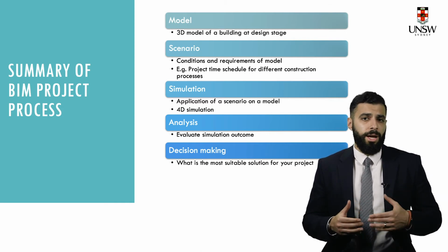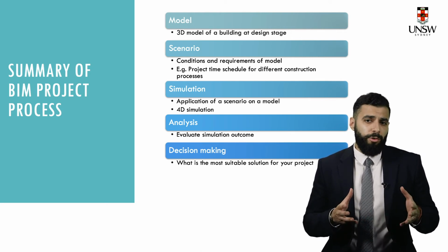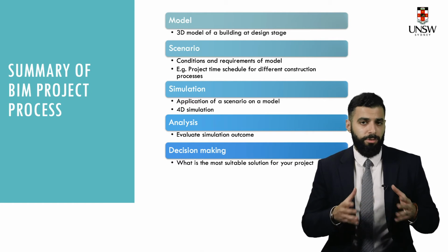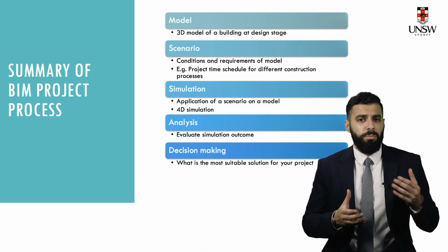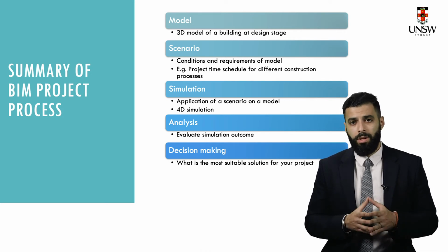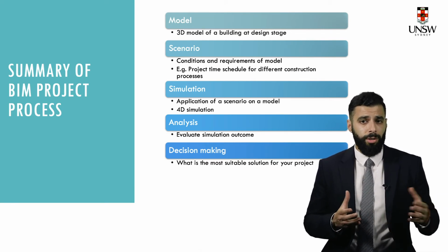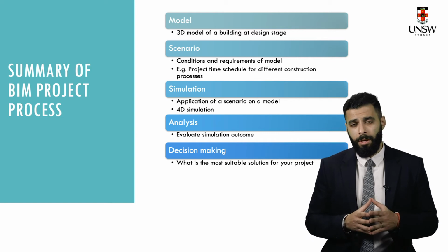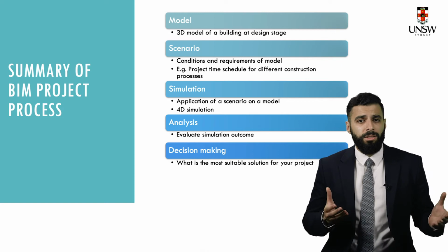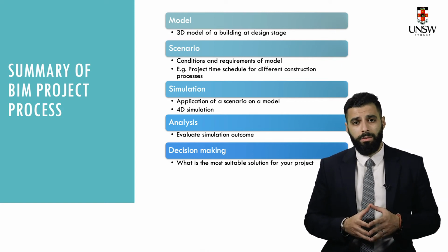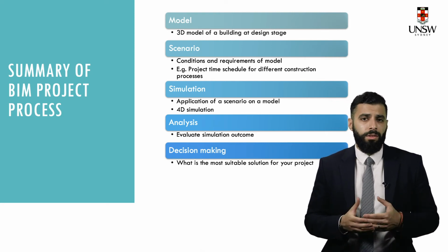So I'm talking here about the conditions and the requirements that are associated with the model. You can look at it from various perspectives. Let me give an example just to make it a bit clearer. What are, for instance, the materials that you need to use, and how will they be delivered? What if the materials don't arrive on time? Do you have any other alternatives? So these alternatives would then form part of the scenarios. What are the rates of the workers that you use to complete the specific activities involved in your construction project? What happens if these rates change?